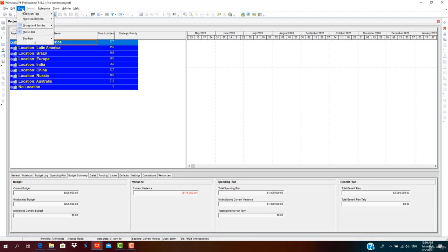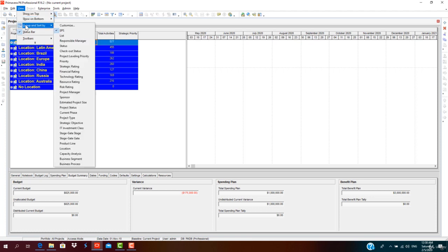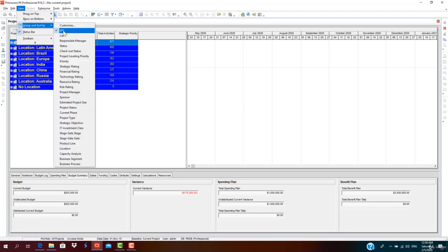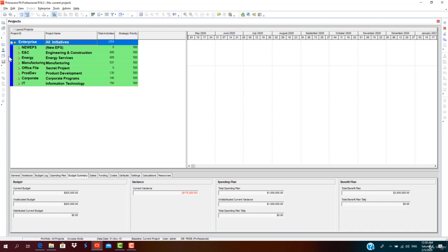In the menu bar, click on View, go to Group and Sort By. It's currently in the location format. Go to Group and Sort By, click on EPS. The layout changes into EPS. Before creating a project, we must create a new EPS.